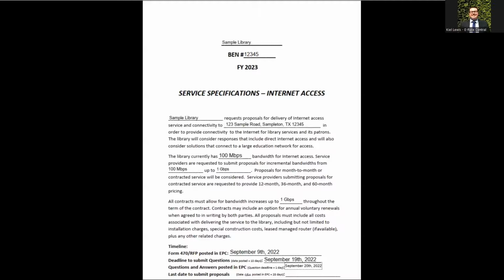If that is the case, then keeping a 28-day buffer from that day is very useful and will help you avoid compliance issues with those E-rate rules.